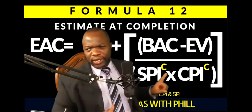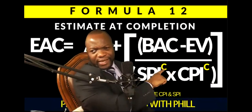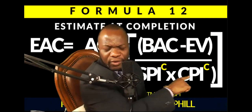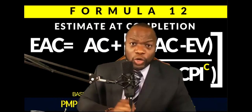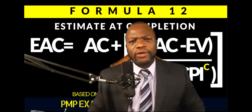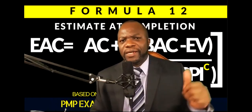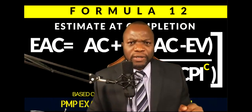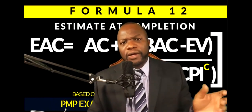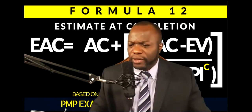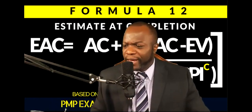The numbers, like if you take a look right here, that C, those two Cs in yellow, those two Cs are cumulative. They mean cumulative. Why am I stressing cumulative? Because inception to date is what you use this formula with. Not current, but cumulative.